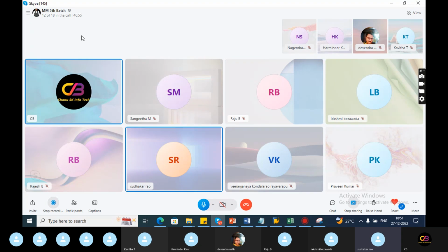Then we will go for the project final preparation phase. Here we will do various types of testing like unit testing, integration testing, along with the help of users for user acceptance testing and all. After completion of the testing, we will go for cutover activity to upload the mass data from the legacy system to the SAP system through LSMW. Then we will go for final go live and support. Here we will give the hypercare support for a few months as per SLA.